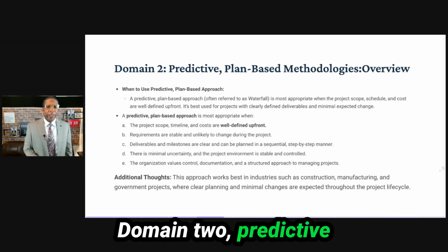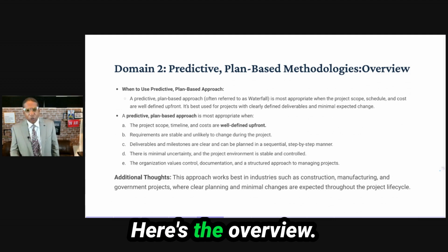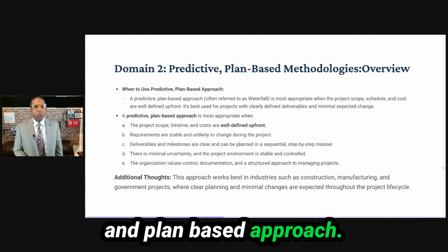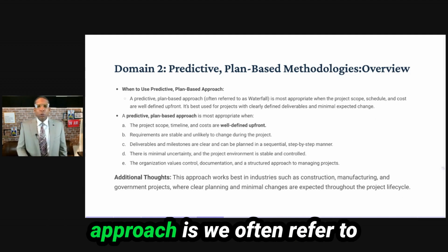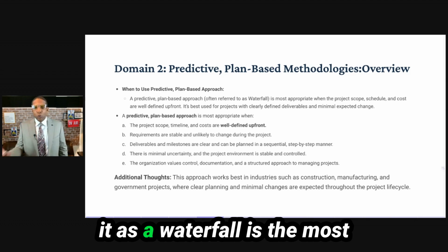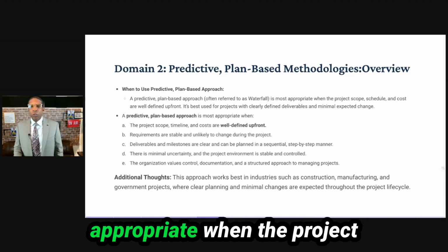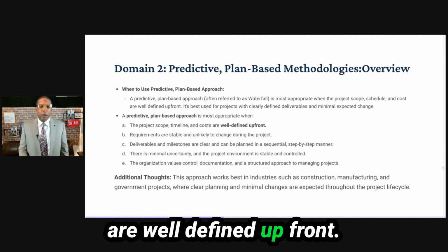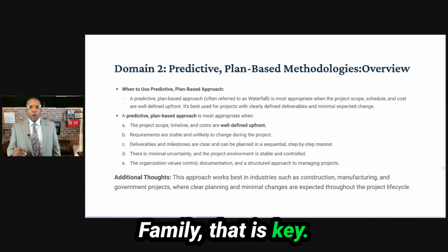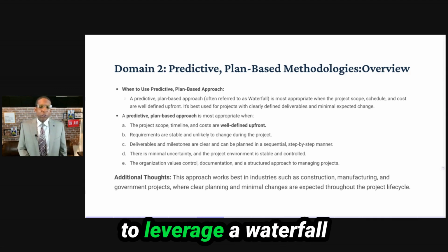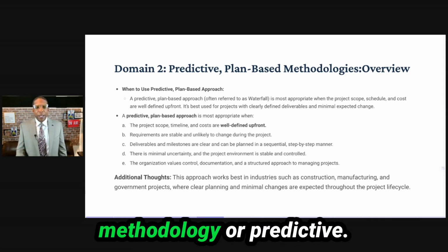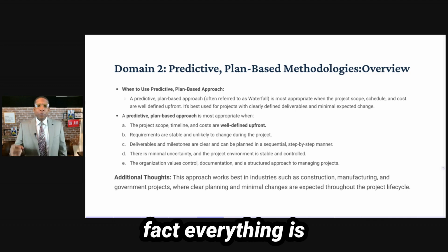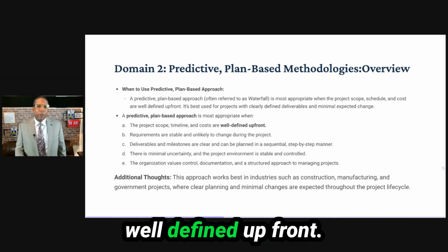Domain 2, predictive plan-based methodology. Here's the overview. When to use a predictive and plan-based approach. A predictive plan-based approach, we often refer to it as waterfall, is the most appropriate when the project scope, schedule, and cost are well defined upfront. Family, that is key. This is when you want to leverage a waterfall or predictive methodology, because everything is well defined up front.